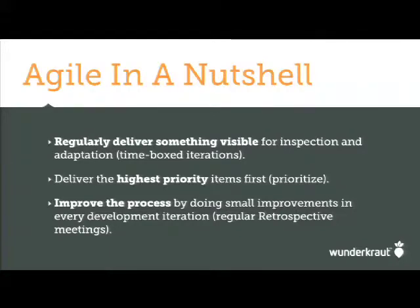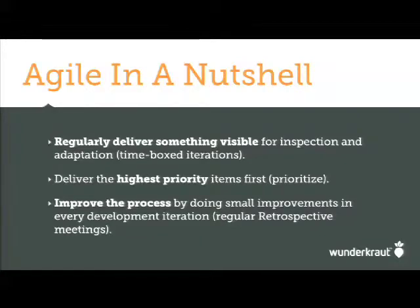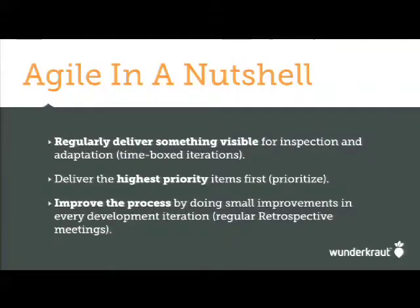Agile in a nutshell: three basic principles in any agile methodology. First, always deliver something visible within fixed intervals — typically a few weeks in software. Second, always start with the highest priority items; never start with the details first or your favourites — always start with what creates most value. Third, improve the process and never stop learning.